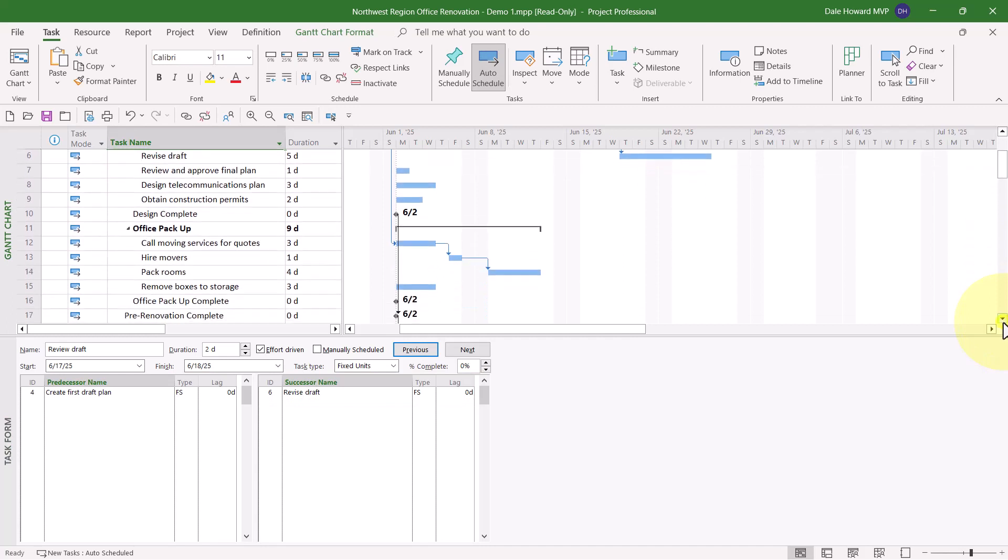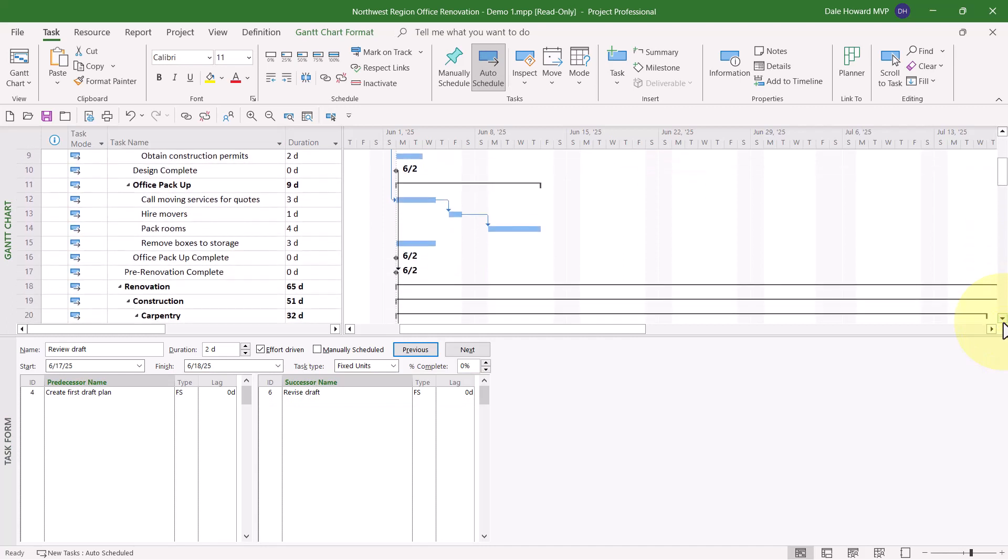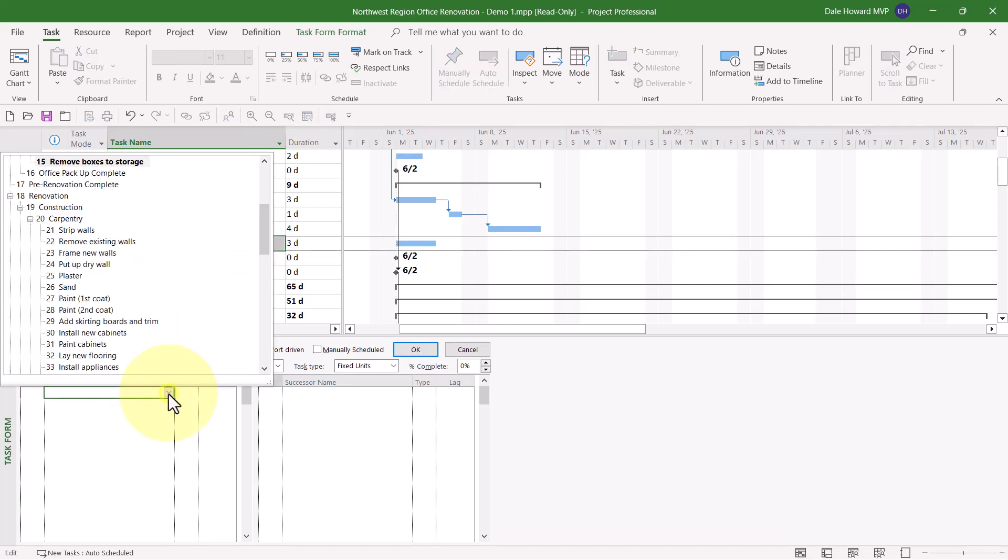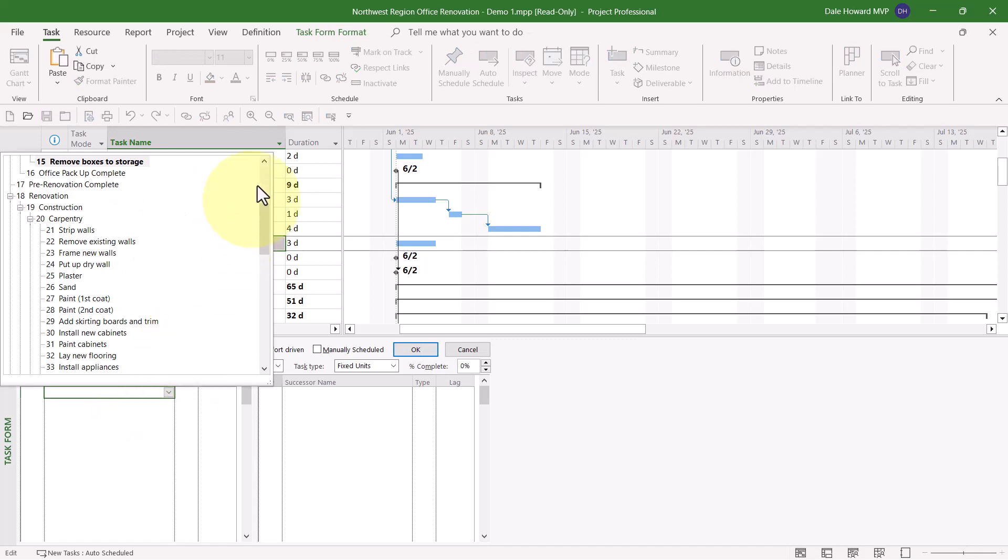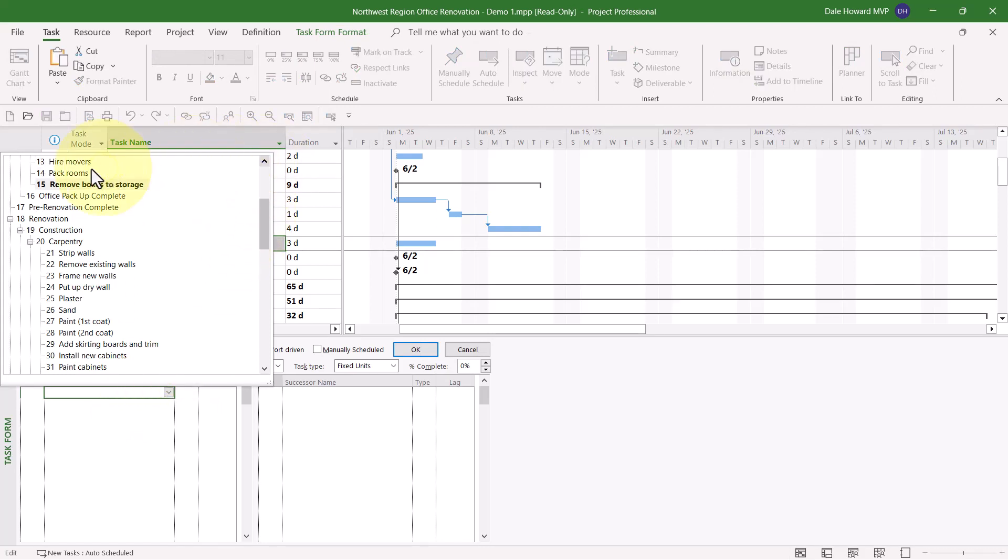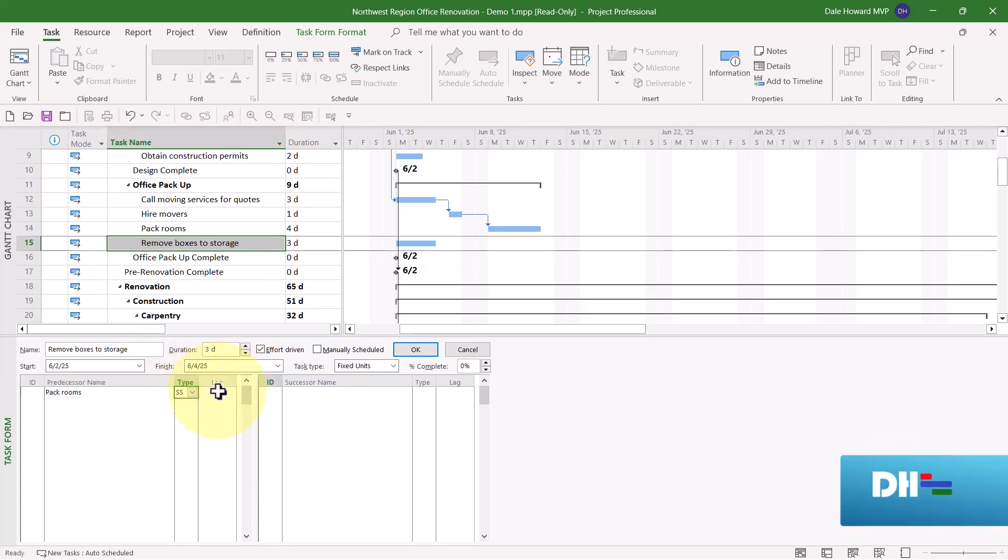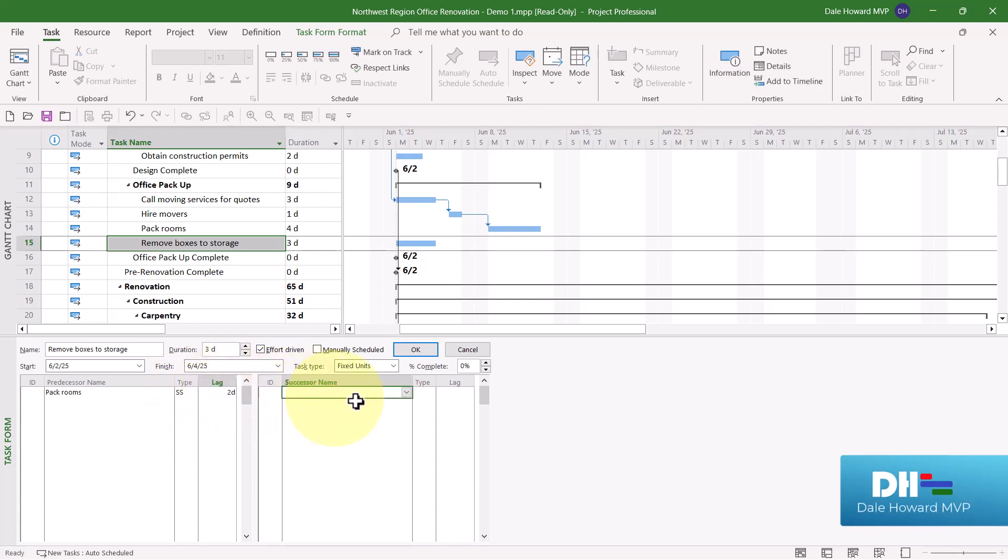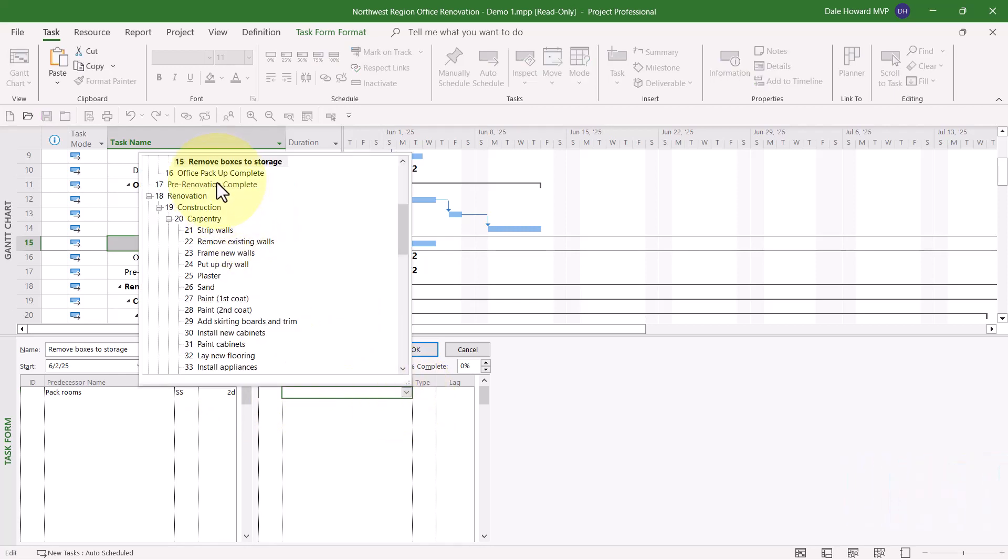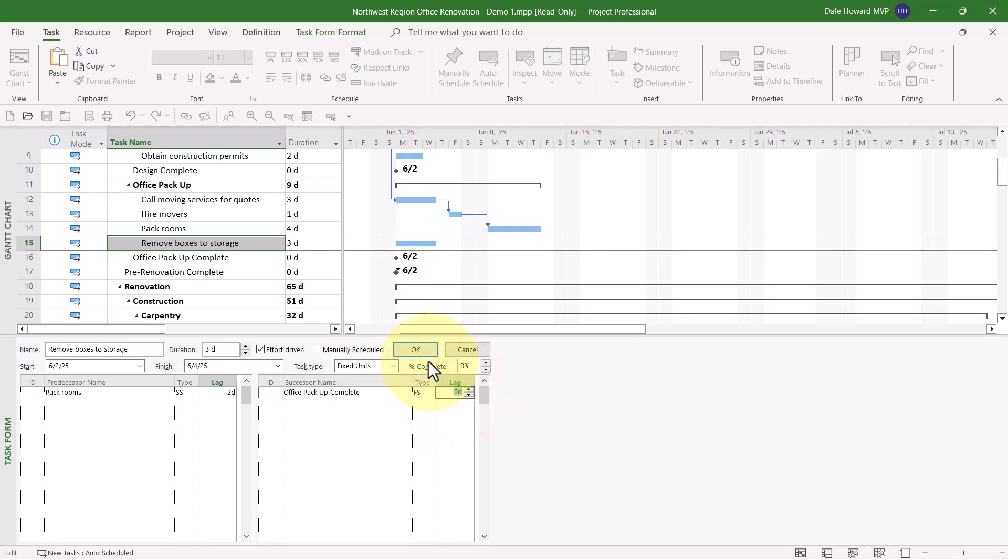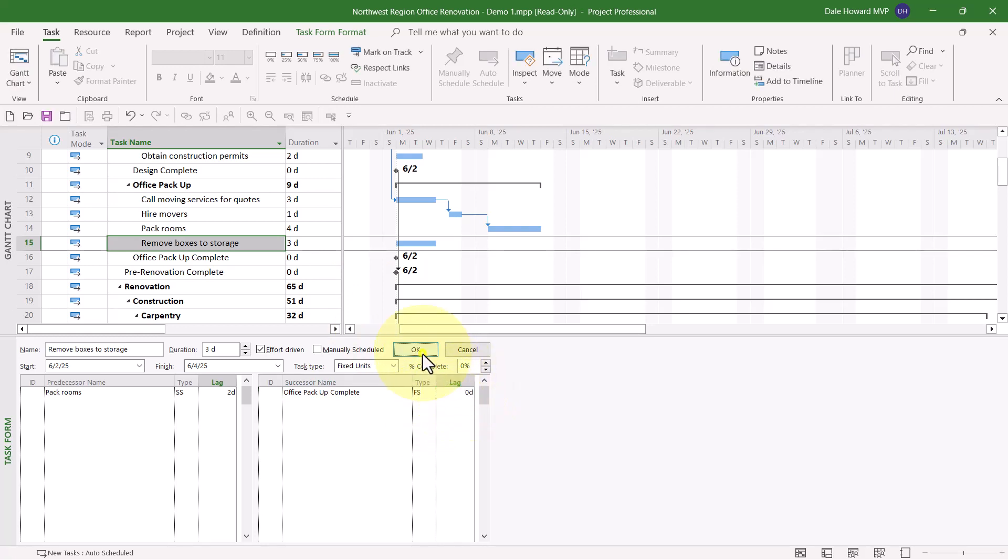This is cool enough that I think I need to show you this again. This time I'll select Task number 15, Remove Boxes to Storage. Its predecessor will be number 14. So let's select that. But the dependency will be Start to Start with two days of lag time. And its successor will be number 16. Office Packup Complete. And the dependency will be Finish to Start with no lag. When I click the OK button, look at that. There's the third trick for dependency planning.